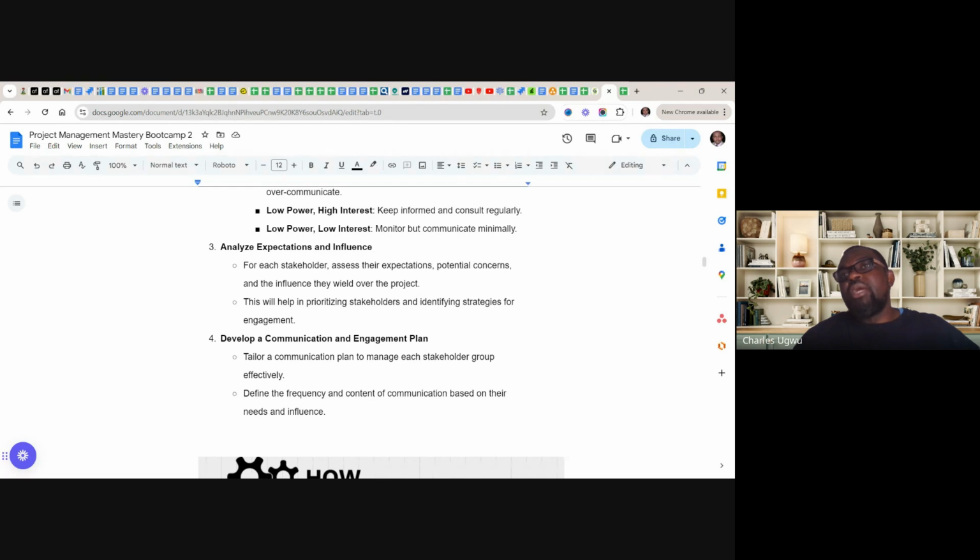And who is communicating? Does the business analyst need to send their report, or should they send their report to you first? Whose responsibility is it to communicate to a stakeholder? You must know that. It means that not everybody is going to talk to the project sponsor. You must identify whose responsibility or accountability it is. So define the frequency and content of communication based on their need and influence.